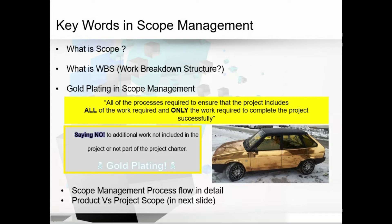Scope changes should not be approved if they relate to work that does not fit within the project charter. That is why PMI does not support gold plating. So this is about scope, work breakdown structure, and gold plating.